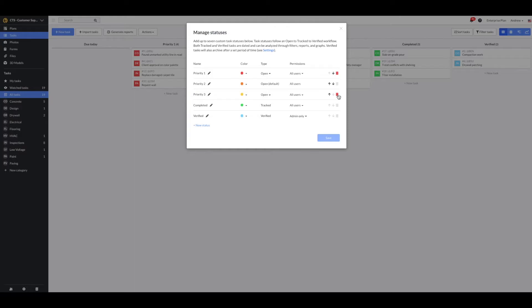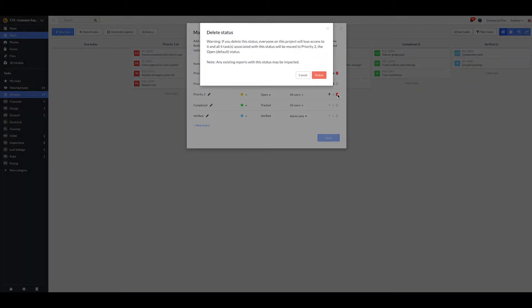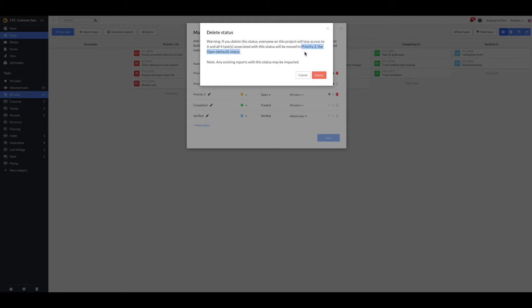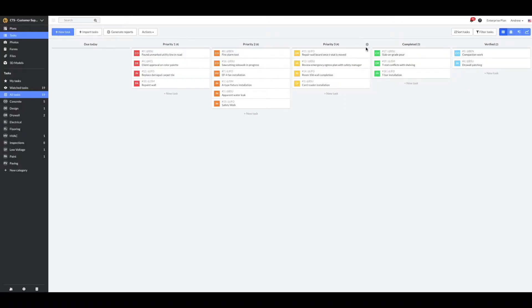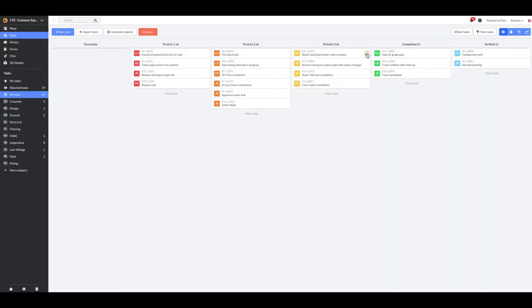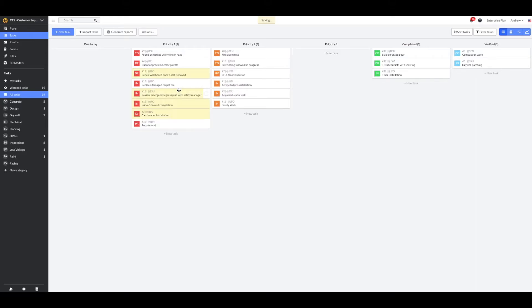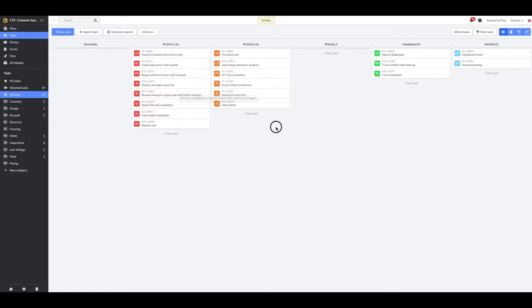Use the trash can icon to delete a status. You'll need a minimum of three statuses but can have up to seven unique statuses for your tasks. When a task is deleted, all associated tasks in that status will be moved into the open default status. Prior to deleting a task status, consider batch editing the pertinent tasks and move those into another task status.